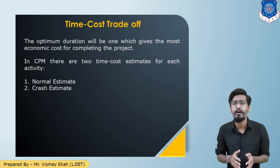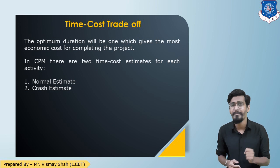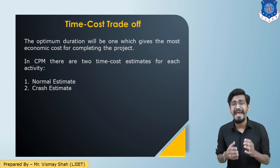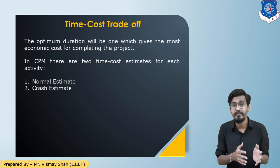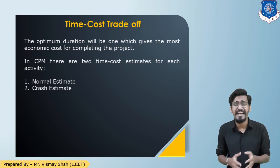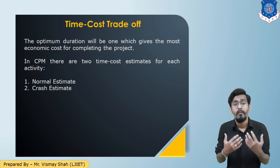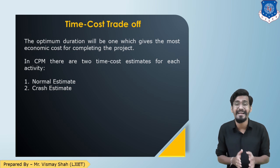There are two kinds of estimates prepared in CPM for each activity: normal estimate and crash estimate. In the normal estimate, we emphasize more on cost — completing the project with minimum cost. While in the crash estimate, we focus on time — in minimum time when we can complete the project and up to what level the cost is going to increase. That is your crash estimate.